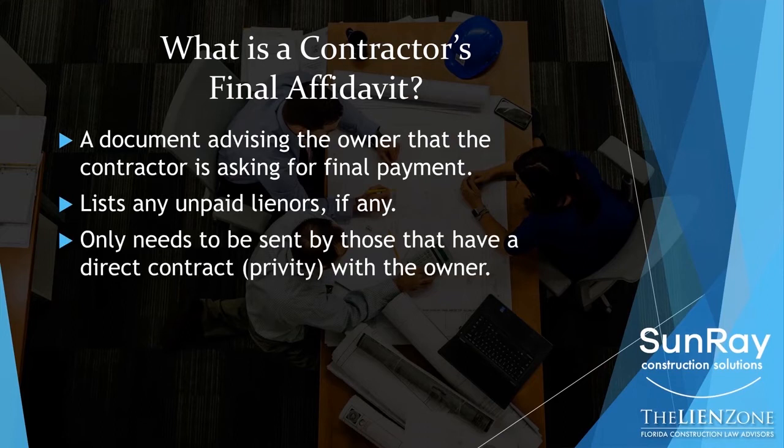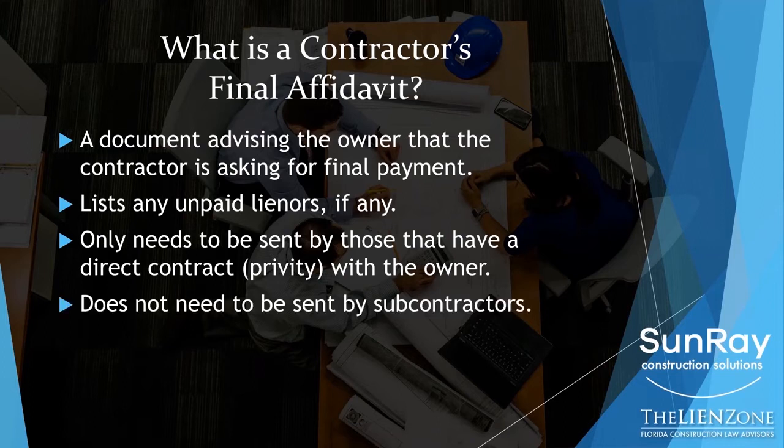Now, one thing that's very important to remember about this form, specifically titled Contractor's Final Affidavit, which is found in Florida's lien law in the statute itself, is that it only needs to be sent by those that have a direct contract, also known as privity, with the owner. So if you are a subcontractor, meaning you have a contract with the general contractor, and you finish the job and you need to get paid, you do not need to send a contractor's final affidavit.